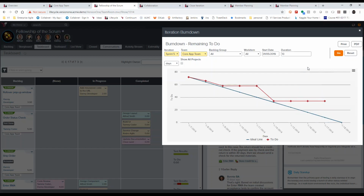Again, this can be a topic for that team to put in the agenda to help them overcome any issues like this. So for example, on my Extreme Programming teams, we had put a practice in place where all of our tasks had to be at least 4 hours to be put in as a task, but it couldn't exceed 1 day. That forced us to ensure that we were completing tasks every day and that we were consistently making updates within our systems to support these types of reporting.